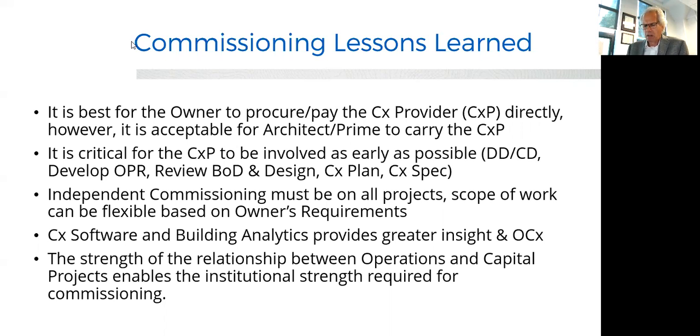We need, and we require, 100% on all communication starting at the end device right up to that patch panel, performed by the BAS supplier, signed off by the commissioning agent. And if it doesn't happen, we run a query at that level. And if there's 300 or 400 of those, you can imagine how much work it is. If you're missing one, it goes back, and we're not telling you where it is. You go back and find it. So after a few trips through that, the world comes to order pretty quickly.